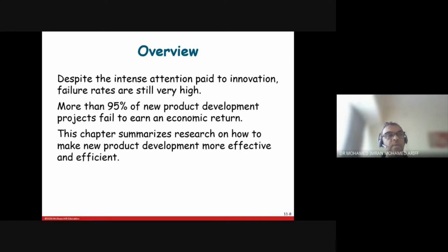So stage gate process sometimes is used for implementation of new products and services. That means you test it in one place. If there is a problem, you rectify. If that's okay, then you can apply it to the next stage. So let's say e-wallet implementation in Aon Ipoh is good. There were some problems, you have managed to solve it. Now you open up the gate. You move on to the next branch.